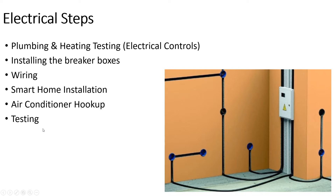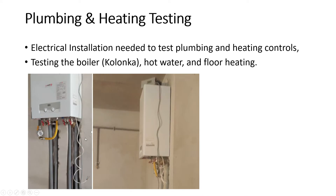That can actually be done independently before you close the ceiling, so there's no hurry, but the most important thing is that you test everything and make sure it works. Electrical is a very serious step. Here's a diagram of how we approached it — they cut channels, but instead of cutting horizontal channels in the walls, we ran wires on the floor, which gets covered with concrete alongside the plumbing and underfloor heating. That probably saved half the labor versus running them along the walls.